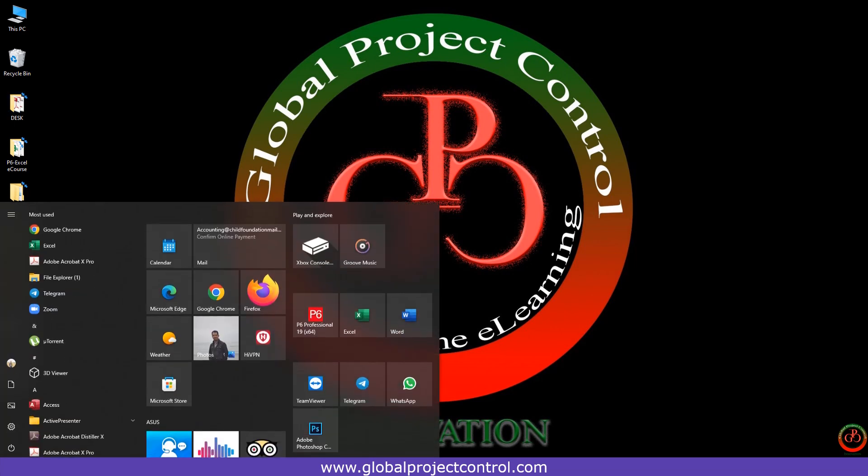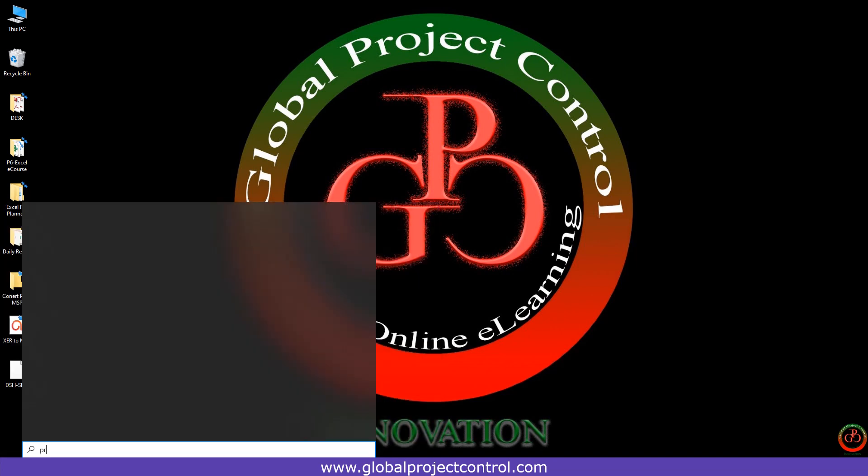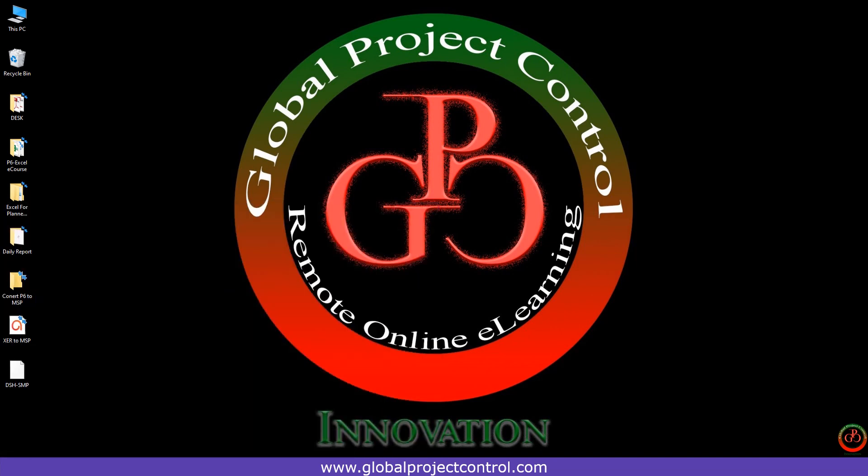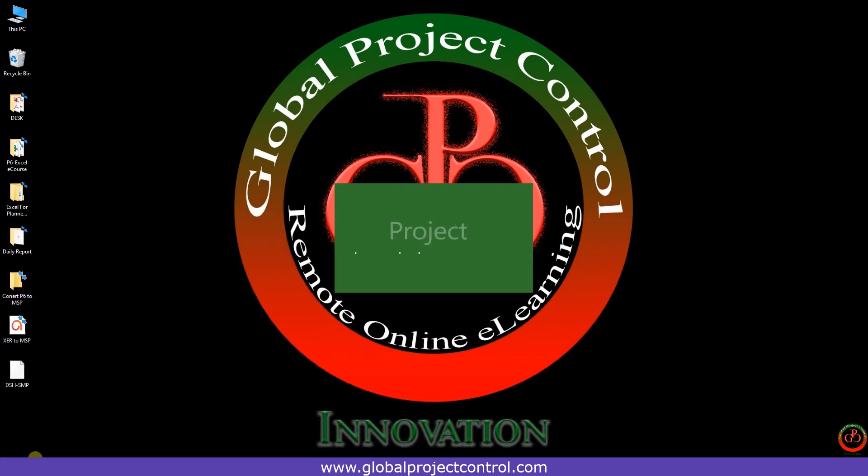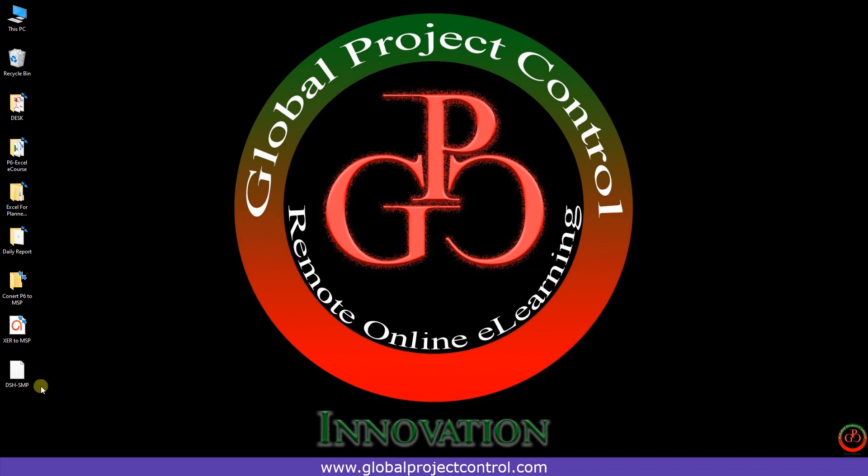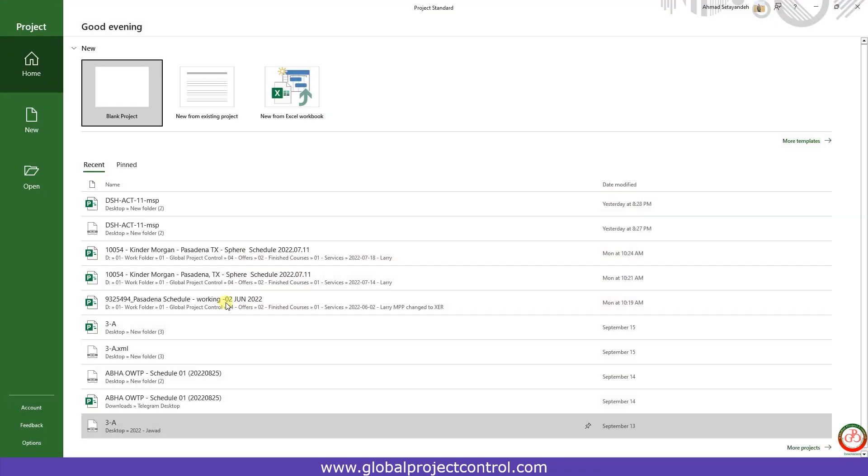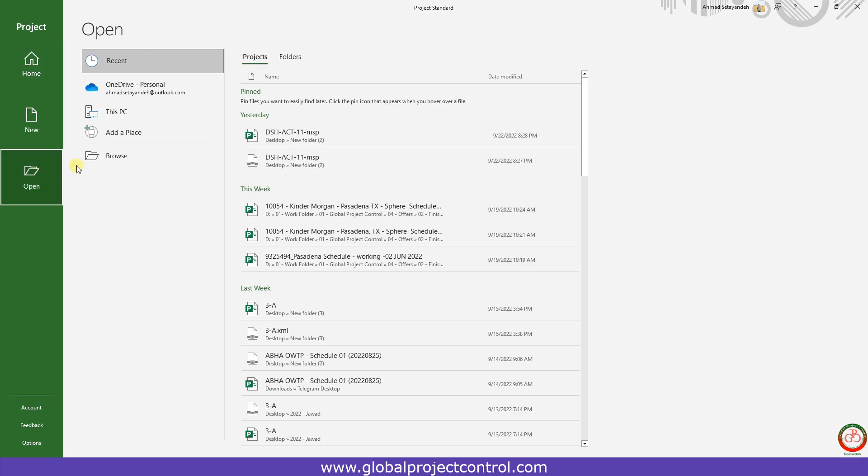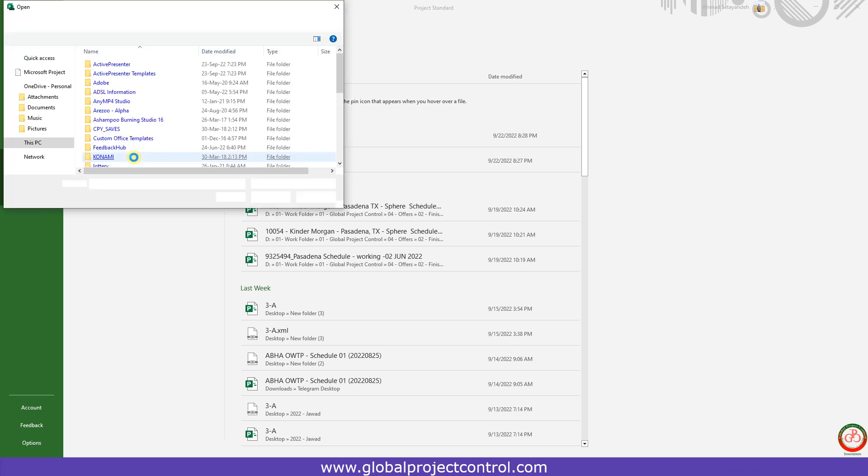I need to open the Microsoft Project. You cannot directly open it with Microsoft Project. You need to go to the Open, then Browse it.